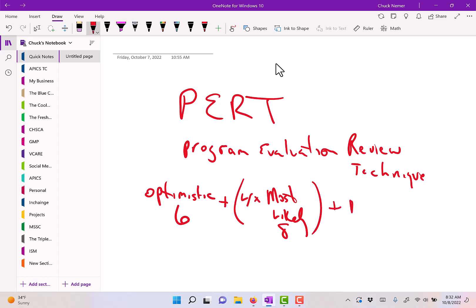Then finally add the most pessimistic or worst case, perhaps 10. Now, I just picked 6, 8, and 10—it's whatever you feel. But if you do the math, then you got 6 plus 32 plus 10, which is 48.